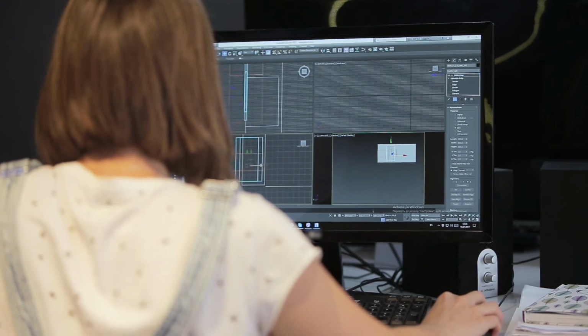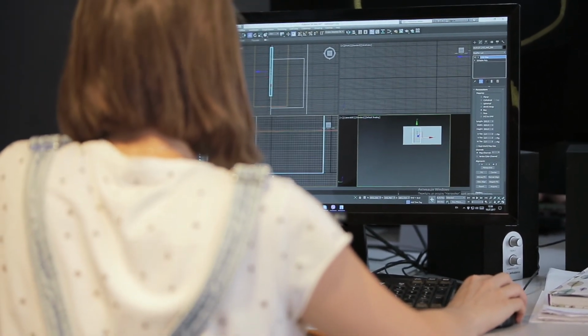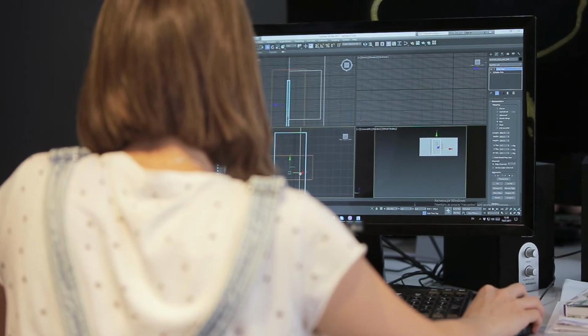And you need to talk about these questions with everyone in your household. During this pre-design phase, we are also creating the existing drawings, or what we also call as-builts. If you don't already have these as-builts, then we need to create them. If you have previously done a renovation or it's a relatively new home, you may already have as-builts that we can go off of for the proposed design. But the majority of the time there are no as-builts. So if we have hired a measuring company, they will provide us with these as-builts and we'll import those drawings into our software. Or if we don't hire a measuring company and we do the measurements ourselves, we will create the file from our site measurements, and that'll be used as the basis of the design.